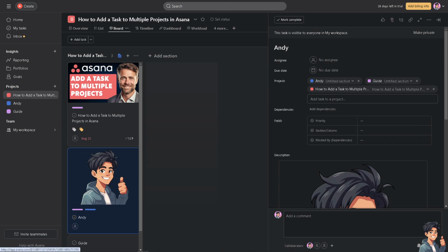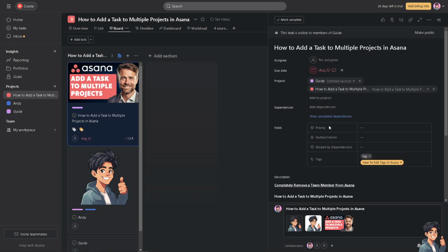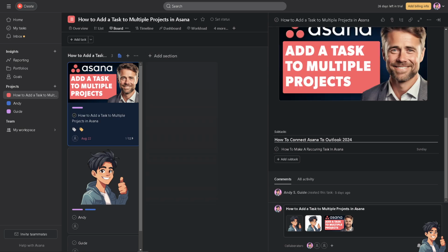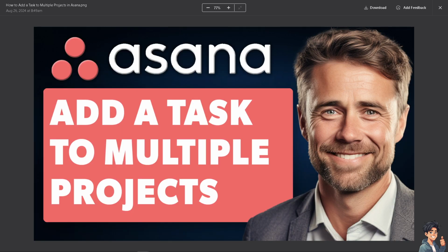The thing that I find very interesting using this option is that a task that needs prioritization across multiple projects now can be tracked centrally, ensuring consistent focus and deadlines. Not only that, when tasks are interdependent, adding them to multiple projects makes it easier to manage and view dependencies, ensuring that teams are of course aware of the tasks that might affect their own timelines or deliverables. In that sense, by including a task in multiple projects, you can gather more comprehensive data, and it is particularly useful for generating reports and understanding how tasks contribute to various projects or details.